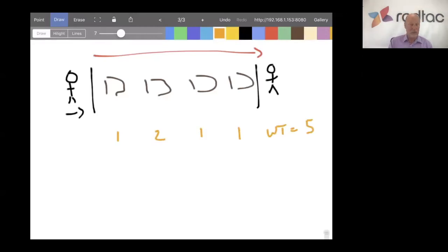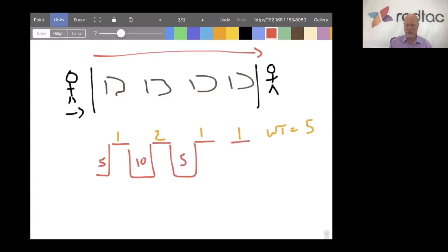However, when we look at the lead time, because we don't have the appropriate level of empowerment, it takes us 5 days to actually get approval to start this work. Then we've done the first step. We now need to go to the legal team to get legal approval. It takes 10 days to get legal approval. We now need to go off and get some more approval from somewhere. That takes 5 days. We need to get some more approval because the empowerment's at the wrong level. So that takes us 10 days. And then it takes us 10 days to actually deliver something, get it approved for delivery out to the organization.